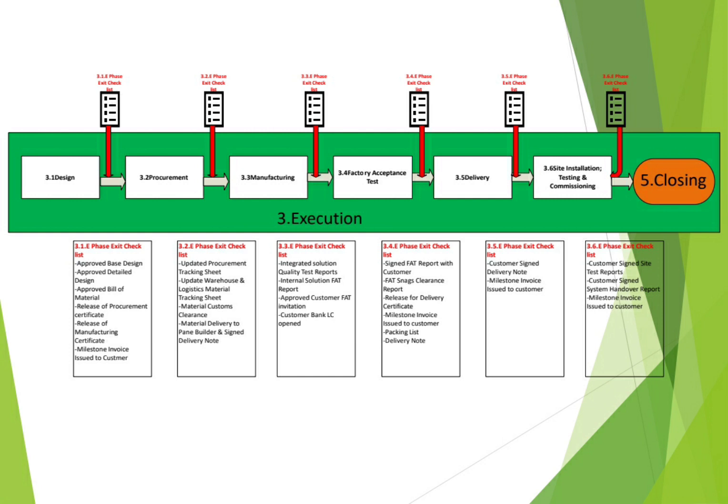So the phase exit for the site installation, testing and commissioning will be customer signed site test reports, customer signed system handover report, and milestone invoice issued to customer.